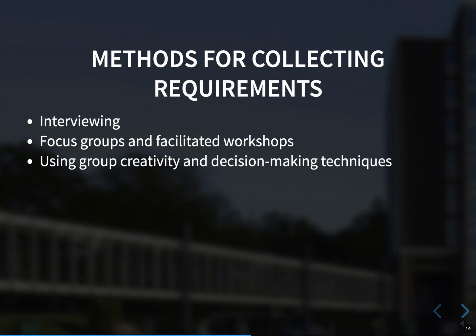Use creativity and decision-making techniques in groups. Depending on the project, it could be necessary to use these creativity techniques, for example, when totally new products or services are planned. Use questionnaires and surveys. By doing that, the project team can collect data which can help for collecting requirements, and this is usually for large user groups.